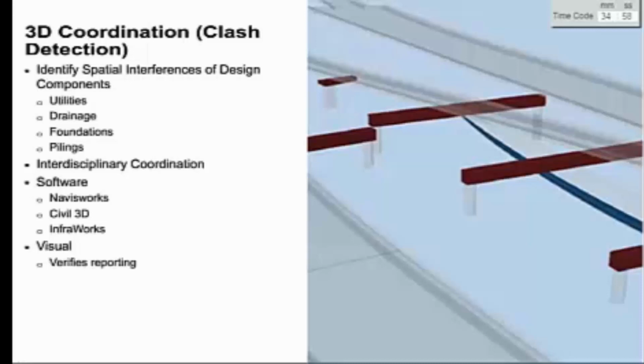3D coordination works best when the elements you are verifying are on appropriate layers or levels in the drawing itself. Our standard practice here at HDR is to keep a record of the base files being compared, where we'll export a read-only 3D coordination model with a date and store in the same folder as our report. Once we have a complete report, we'll identify individuals responsible for resolving each conflict, whether it be through redesign or subsequent engagement with other disciplines or owner. Coordination is not complete until responsible leads or designers have acknowledged the conflict and acknowledged ownership of the conflict resolution process.